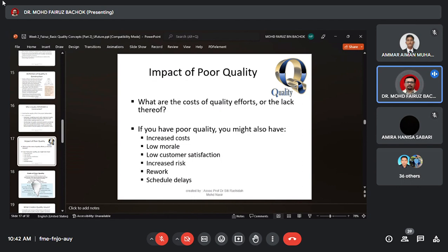When your worker gets injured because of the failure in the construction, the thing doesn't end there. Your worker can summon your company, and the authority will come to the site to investigate what happened, and then the project will be stopped, with impact to you as a contractor. And then you also need to redo the work, which takes more time and more cost, and it will delay the schedule, and over the delay, you can be charged.